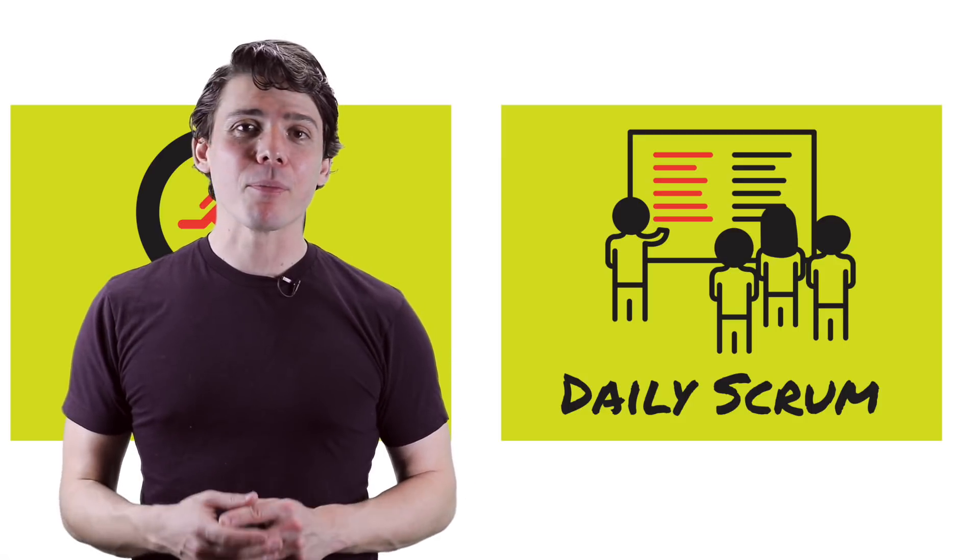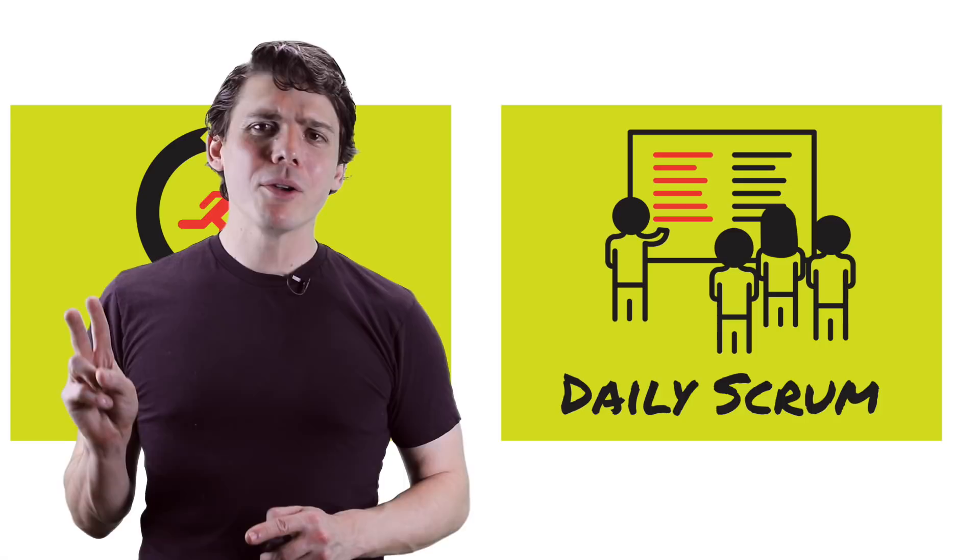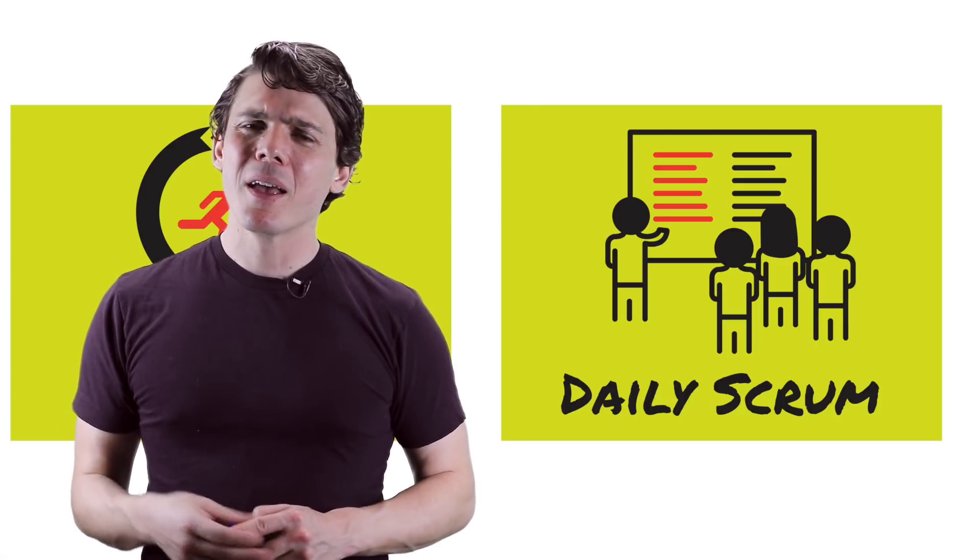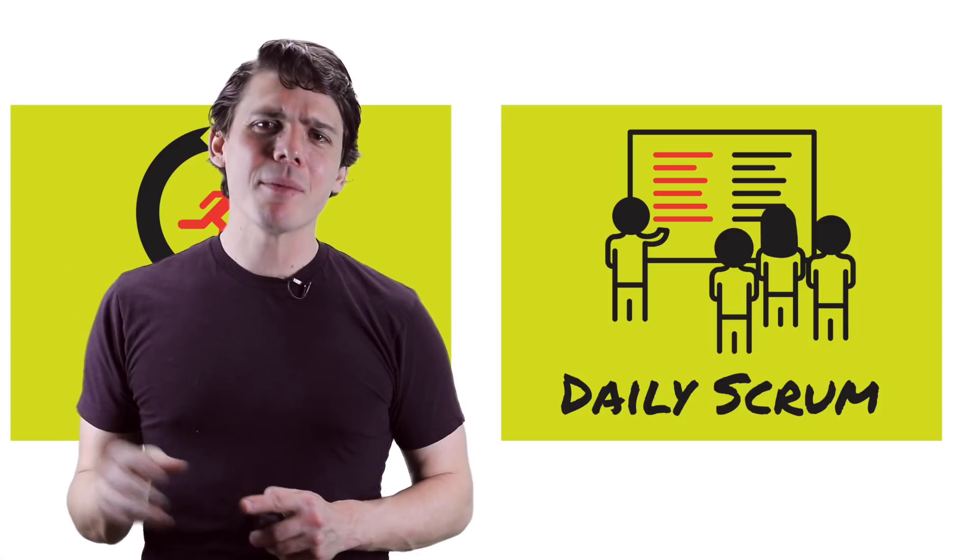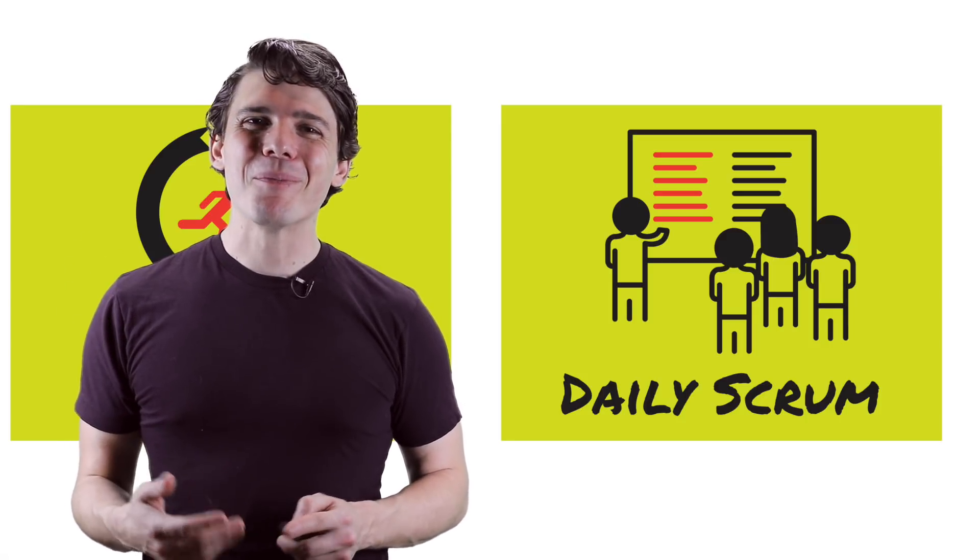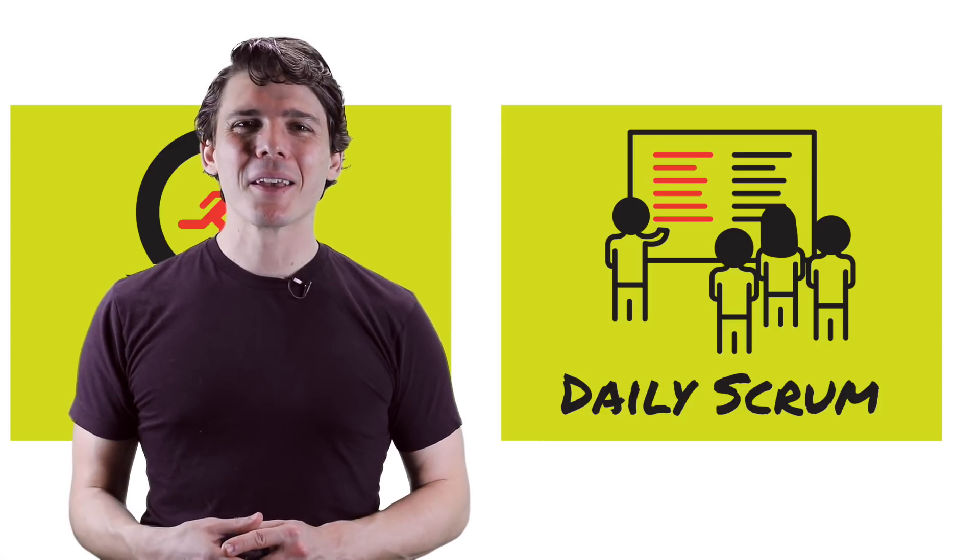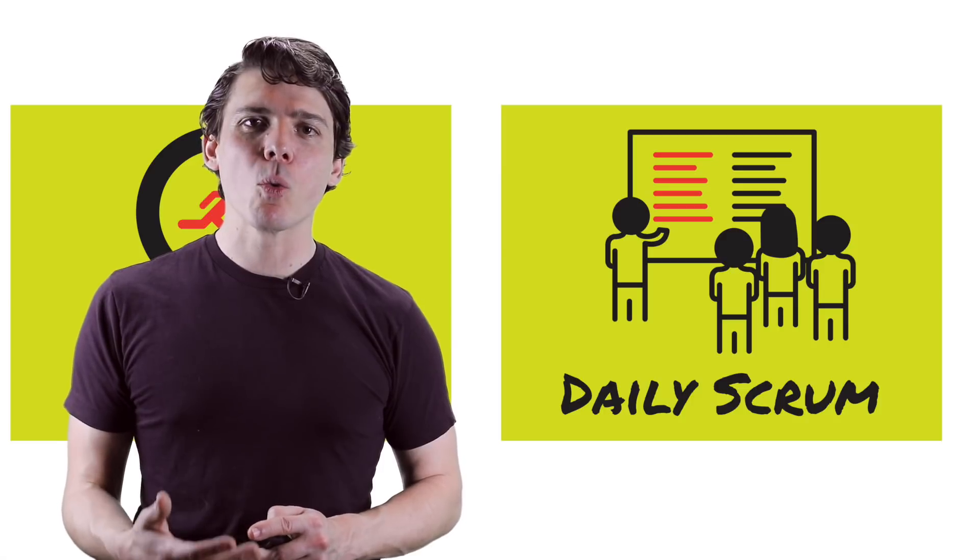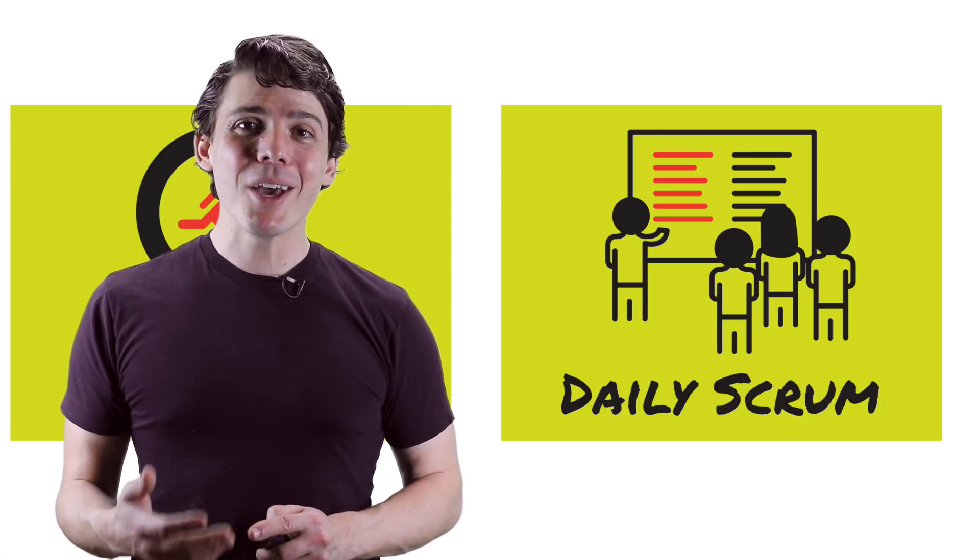During the daily Scrum, each development team member typically answers three questions: What did I do yesterday that will help our team meet our sprint goal? What will I do today that will help our team meet our sprint goal? And do I see any impediments or blockers that will prevent me or the team from meeting our sprint goal?